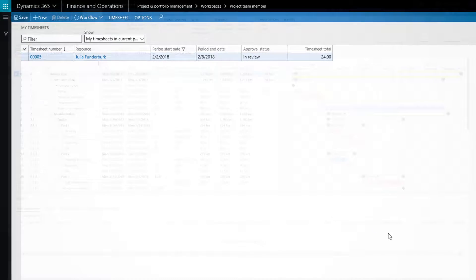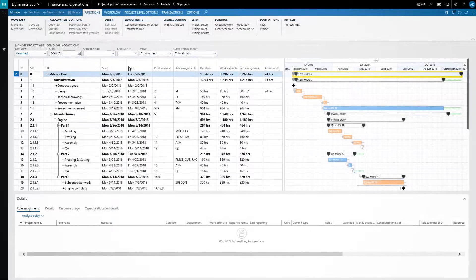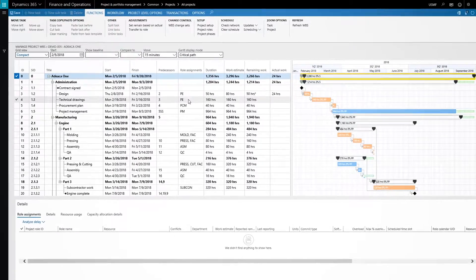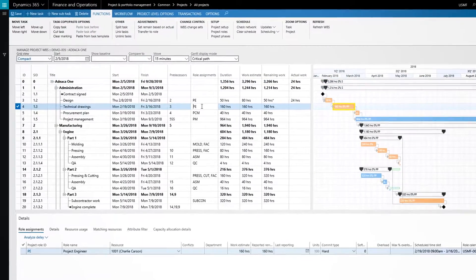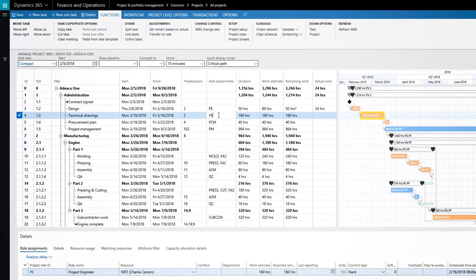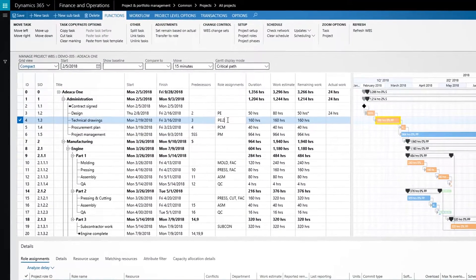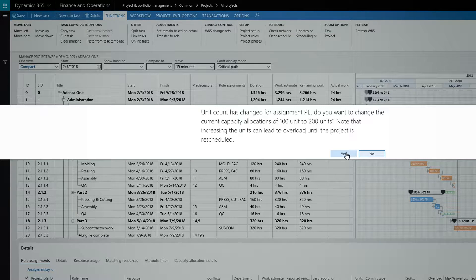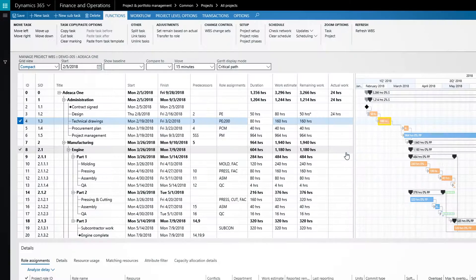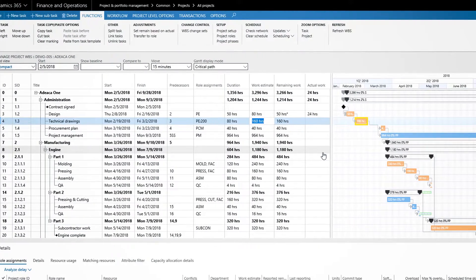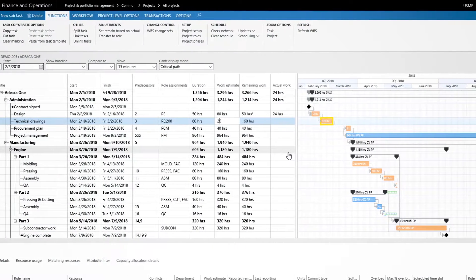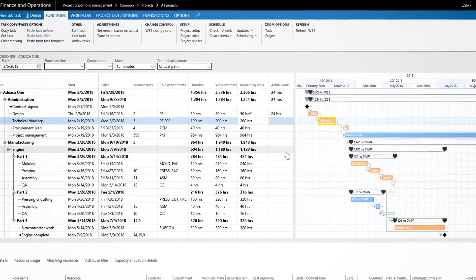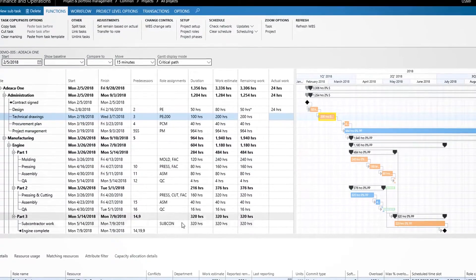In this final example, the project has fallen behind schedule, so we're speeding up the plan by adding more resources. Increasing the work estimate not only requires more capacity, it also creates a future financial impact in the form of additional labor costs.